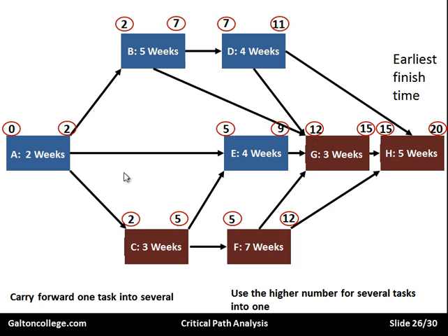There's a 12 there. Like this 2 plus 3 is 5. That gives us that 5. And the 5 goes there. 5 and 7 is 12. So this 12 can go over there or it can go up here. So we always take the largest number, so we take 12. And that's why we don't have that 7 coming down. And we don't have this 11. 7 and 4 is 11. We don't have 11 coming down, we have 12.